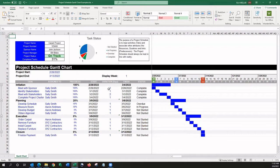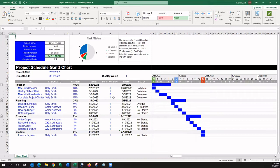When we input the duration, the dates will automatically change based upon the logic of the tasks, the sequential logic of the tasks, and the duration of each task.